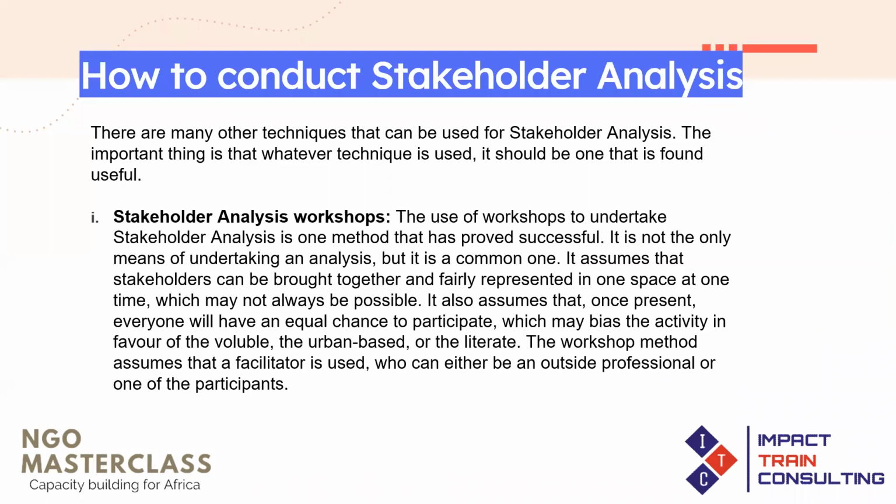Now, there are many techniques that you would use for stakeholder analysis. But the one that is very common that we always see is what we call the stakeholder analysis workshops. Stakeholder analysis workshops are common because, one, project management is participatory. So you don't want to sit on your own to carry out a stakeholder analysis. You want to involve other people, people within your organization or within the project that you're working in, to help you identify the various stakeholders who are going to be affected or who can affect your project. So a stakeholder analysis workshop is one method or tool that you can use to identify and to also plan for your various stakeholders.